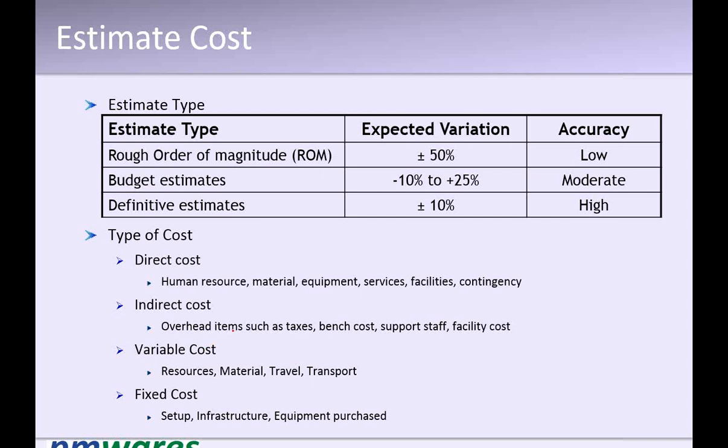See, you don't know how a project will be done. So you float a tender and ask people to bid for it with their approach. They give a quote with their approach. You compare; you get 10 such quotes. You compare all 10 bids with respect to their approach and their cost. Now you can assess what the approach and the cost of the project should be. That is called vendor bid analysis.